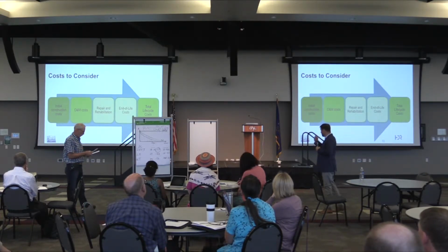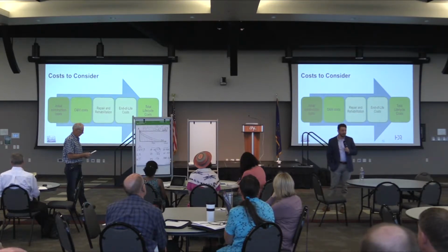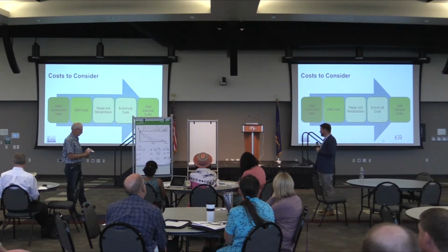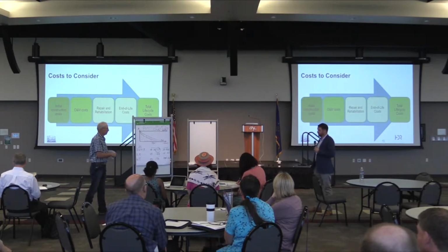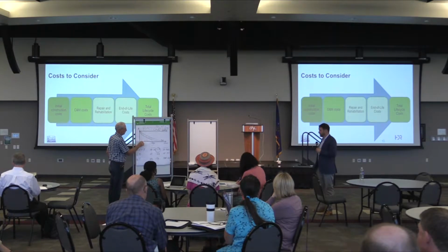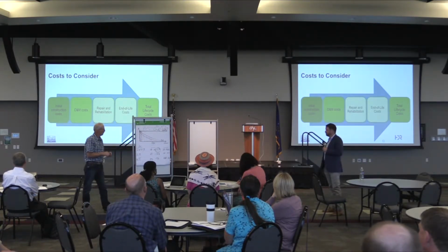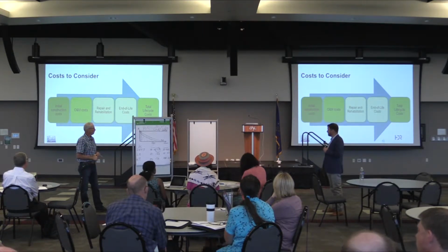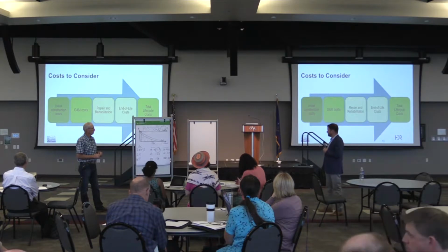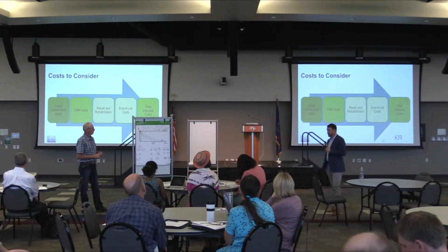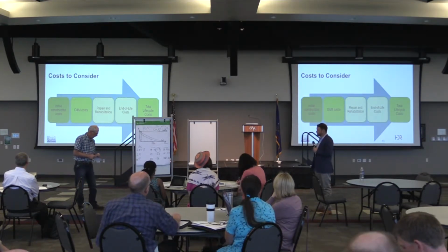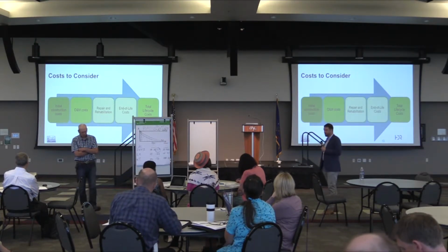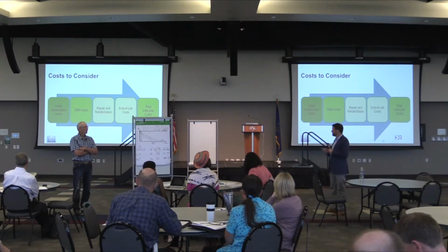So, expanding on that, in the life cycle cost analysis framework and in the model that you have in front of you, the way this works is from a life cycle cost analysis, there's the initial construction costs. That should include all of your costs to construct the project, including construction, real estate, planning, engineering, design, construction management, all of those different aspects, your contingency. All of that gets entered into your initial construction costs. Then you're going to go into your operations and maintenance phase, and we've simplified that in the model. We'll get into that in a few minutes. Then there's your repair and rehabilitation cycles, and then your end-of-life costs. And the sum of those, when we convert everything to present value, gives you your total present value life cycle costs.